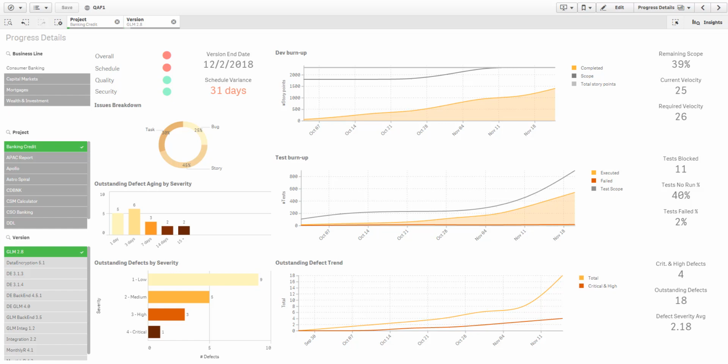As a project manager, I would discuss with our product owner about the late scope creep that is threatening our ability to release on time. Regarding our testing strategy, it would be wise to start testing activities earlier to make sure that we are not bogged down by a large number of defects towards the end of the release. This marks the end of the product owner scenario.